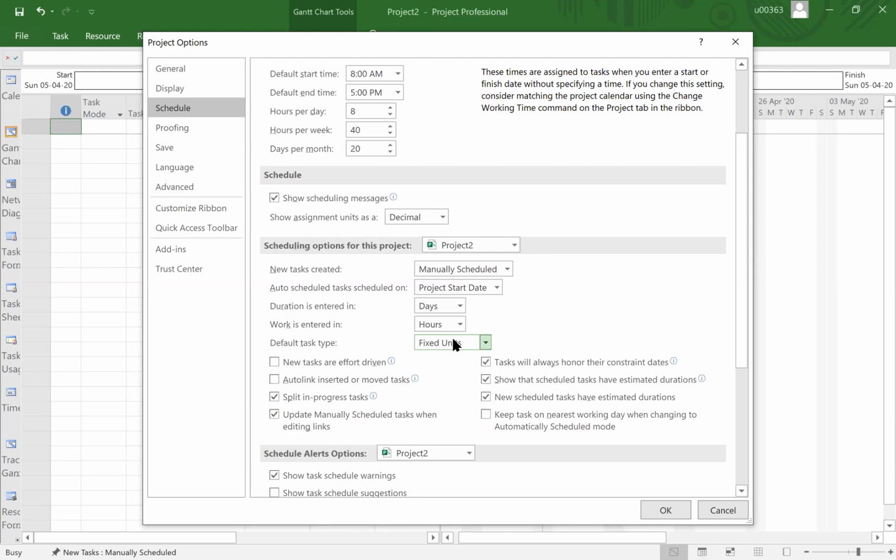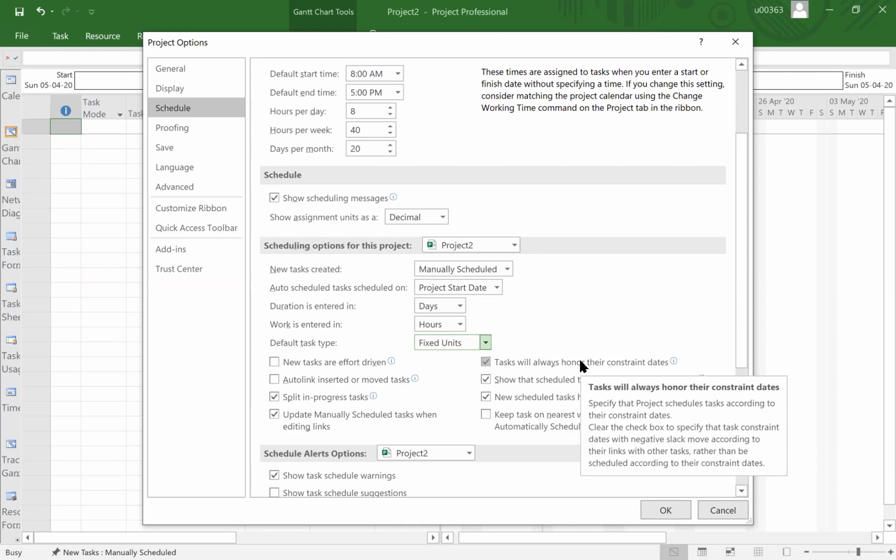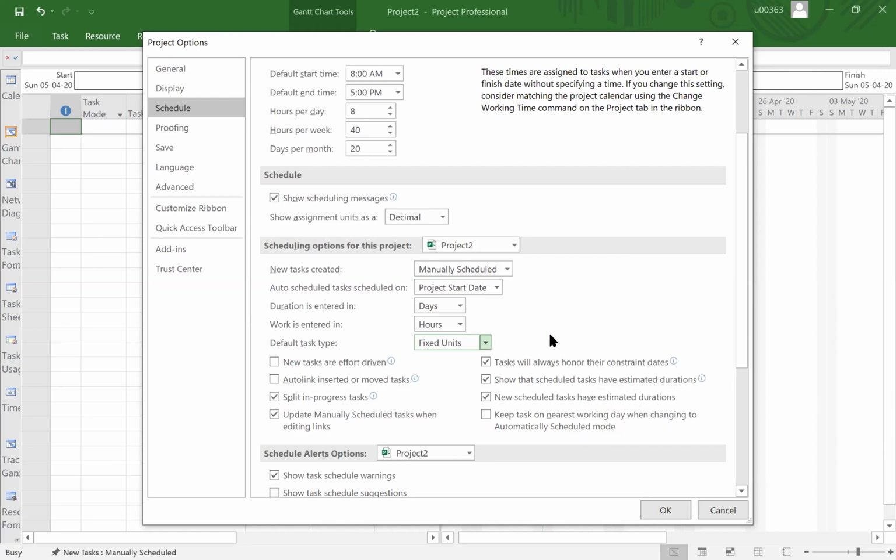But for logistic purposes, especially if you are using a tower crane, you just simply cannot have so many cranes at the same time. You just simply fix one. So if you fix one tower crane, meaning to say you already fix the resources first, and you let the duration vary. To vary meaning to say it will change accordingly. If you do that, then you might want to tick this box here.